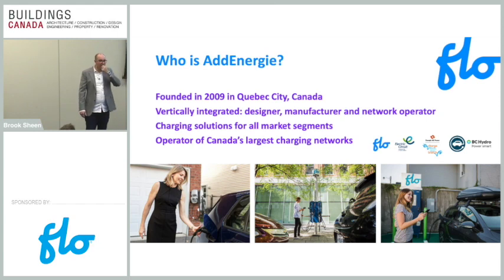So what a lot of times we recommend is utilizing the electrical contractors that you have on site, because you'll save 30 to 50% on install from a civil and electrical works perspective. And we can work with them if they have questions, or if they haven't done it before, on how to best optimize it.